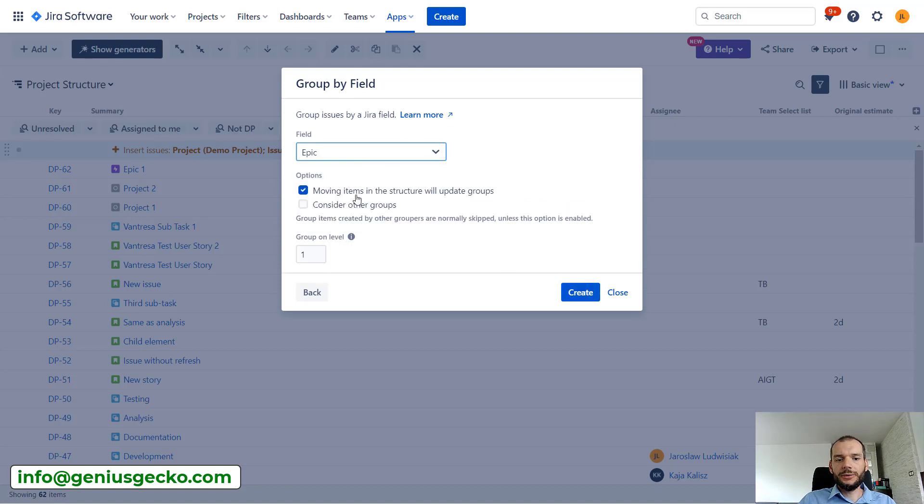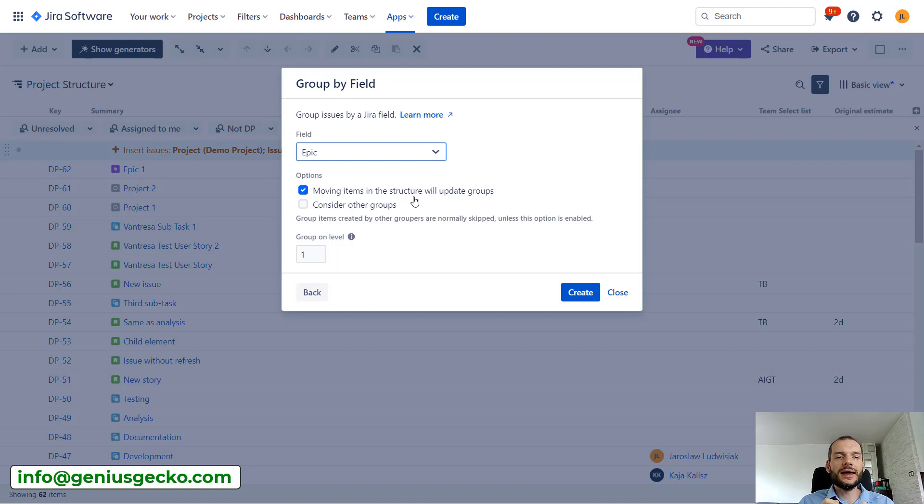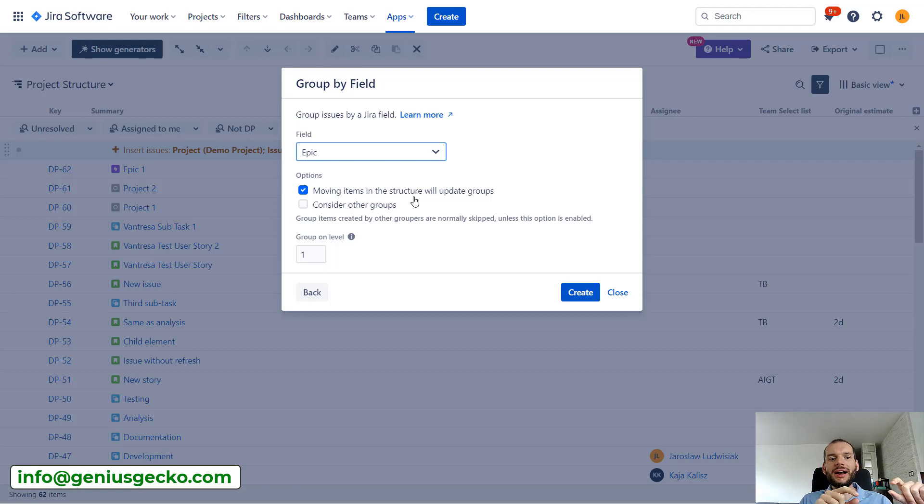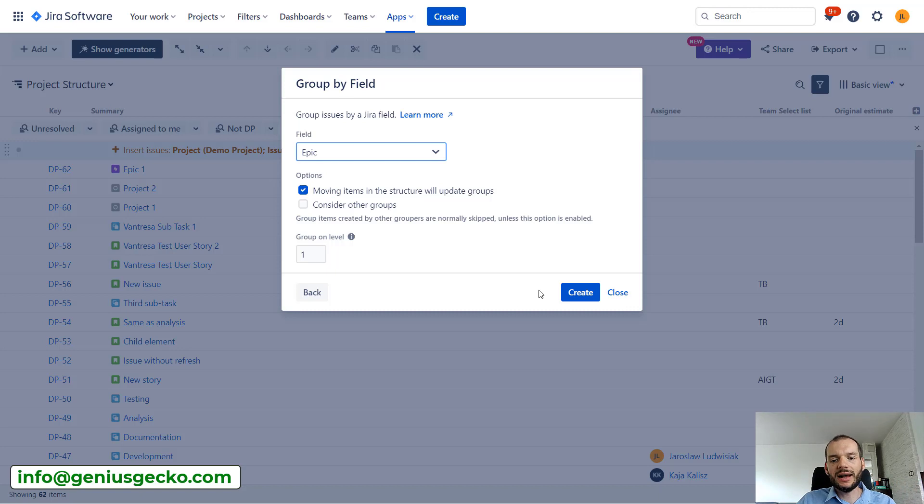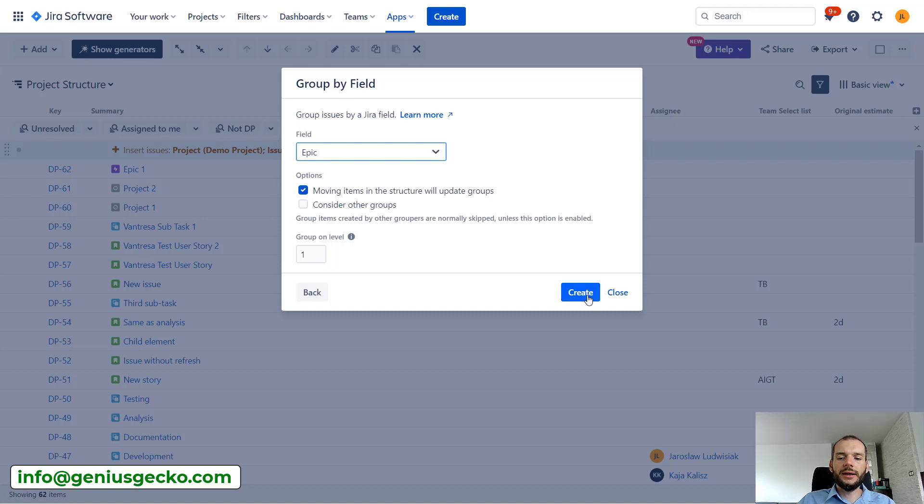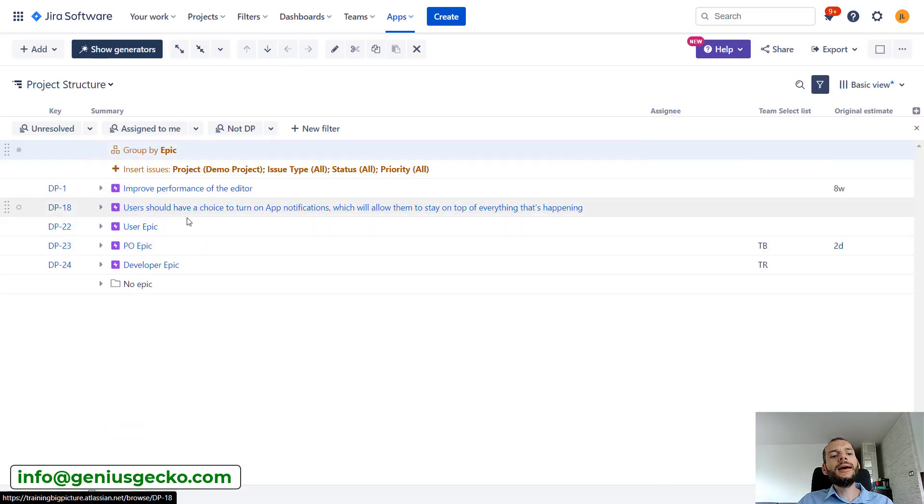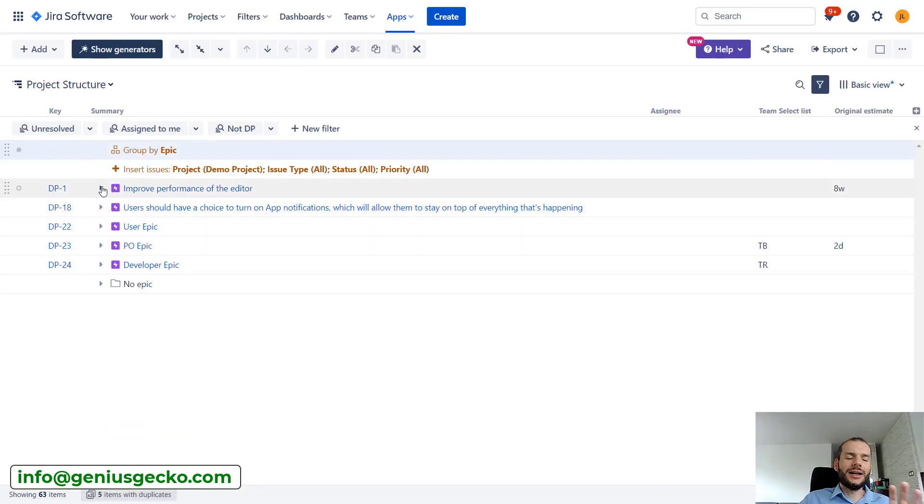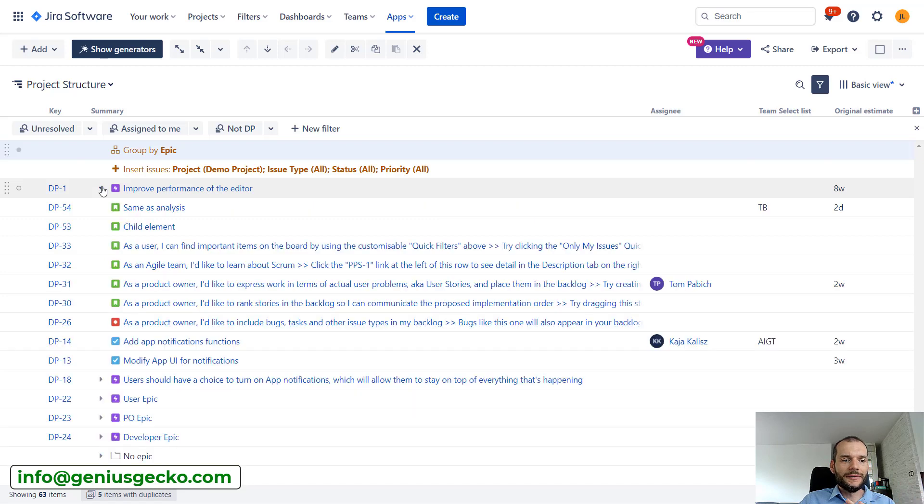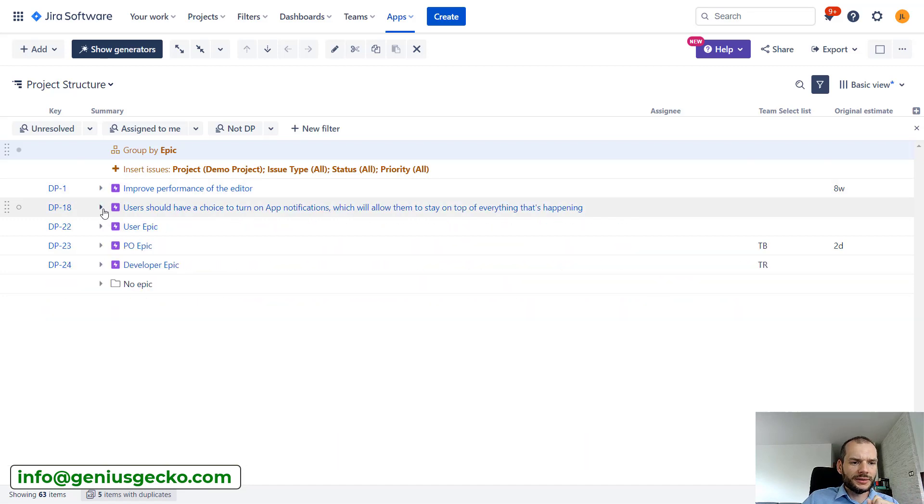So there are several options or two over here: consider other groups and move items in structure will update group. So basically if we leave that selected, if you move the task that is a child of one epic in hierarchy to under the other epic, this will also update the task. So this is worth remembering that depending whether you select this or not, there will be two-way synchronization between the task and structure. Okay, so let's create that. And nicely, you already see that we have tasks grouped under the epic.